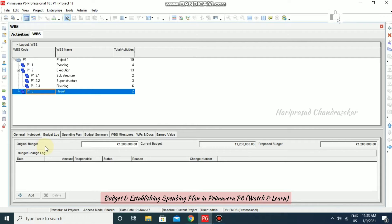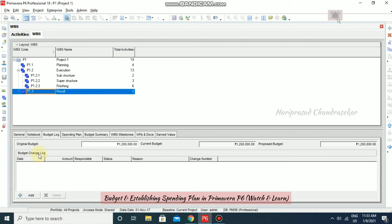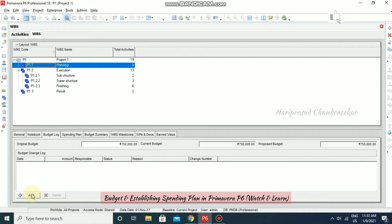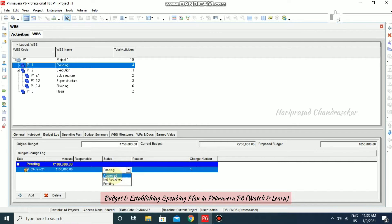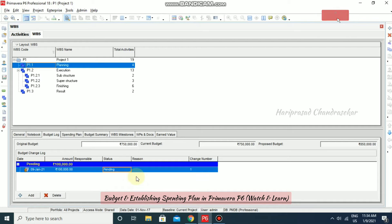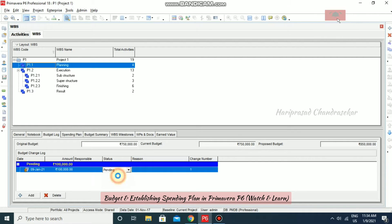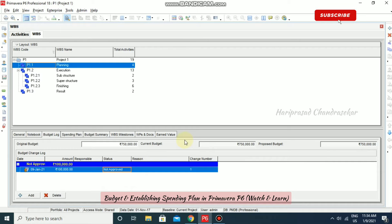Now the Budget Change Log. You can use the Budget Change Log to keep track of budget changes whenever they occur. For example, in Planning, if you have any additional expenses, you can add — say 1 lakh. The status has three options: Approved, Not Approved, and Pending. If you put Pending, the proposed budget will change to 8 lakhs 50,000, but the current budget remains 7.5 lakhs. Once you approve it, the current budget becomes 8 lakhs 50,000. If not approved, everything remains at 7 lakhs 50,000.